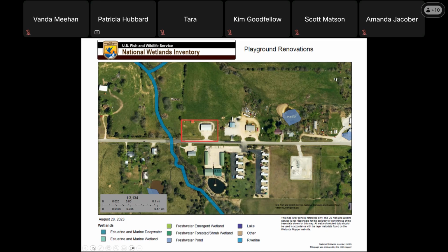If you have a ravine or stream that is just outside of the project area, you should contact the U.S. Fish and Wildlife, or I'm sorry, U.S. Army Corps of Engineers, and make sure that your project runoff will not be affecting that ravine or stream.